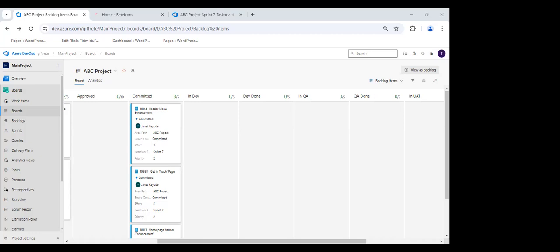You saw them talking about committing the things into the sprint. So when they agreed on what they wanted to do, they decided to commit it into the sprint. They've agreed. So remember, it's the product backlog. Then it has come to the sprint backlog with what they are doing during sprint planning. Remember the sprint goal, right? And then the moment she changed that to show sprint 7 and committed all those stories to the sprint, it becomes your sprint backlog officially, right? Because that's what they are working on. And that sprint goal for the next 2 weeks, that's what they'll be working on.